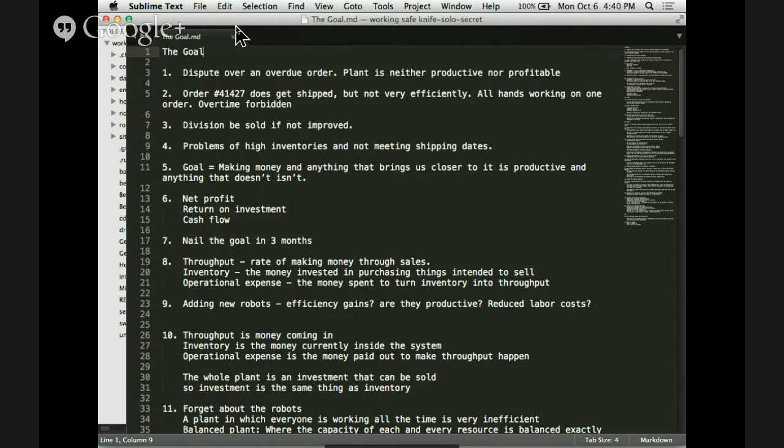What it boils down to from a work item perspective is that if you have a slow item, or slow machine, or a slow worker that is going to be applying his or her work time onto a project or a work item, you want to look at that from an operations perspective, understand who is slow, understand who is fast by measuring them and allocating them appropriately, and emptying their backpacks, giving them proper shoes if they don't have them, but making sure at the same time they're working all the time.